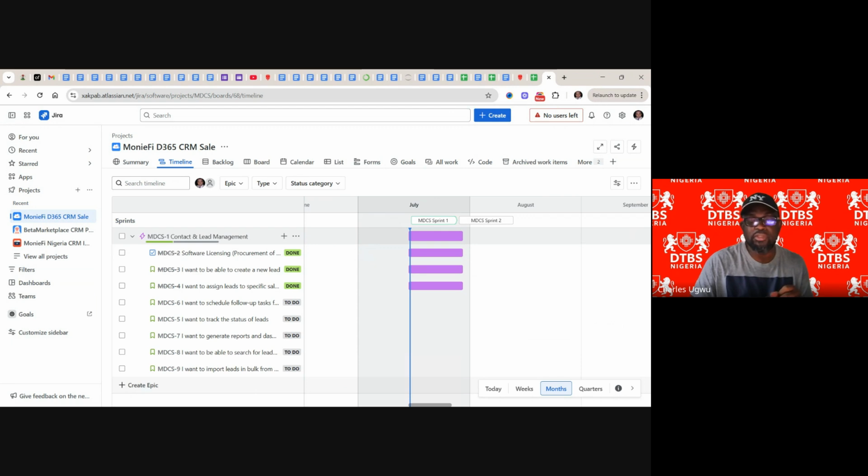You have to submit an acceptance form to the stakeholder, and the stakeholder will sign that they are happy, they received your work, and then the project manager will proceed with project reports and close the project, and everybody will celebrate.